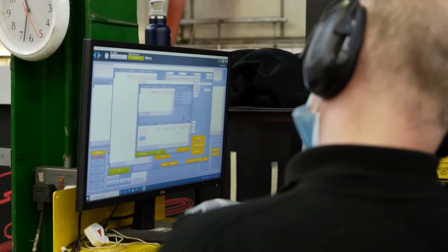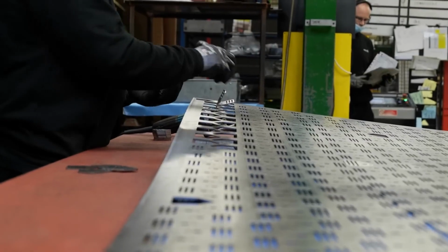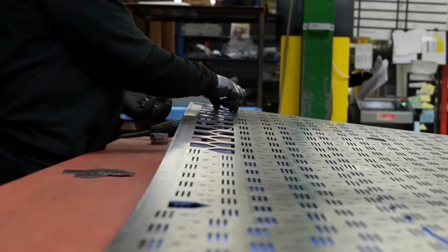We then come up with a work breakdown structure, set a timeline, the most important thing being the time when they're going to go live, so we call it the go live date. And then we work around that with a training and implementation plan and then a full package of support after going live.